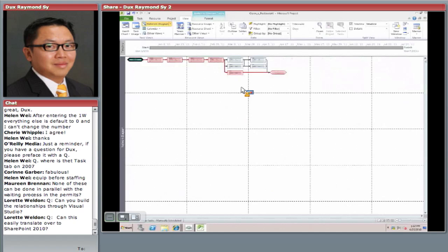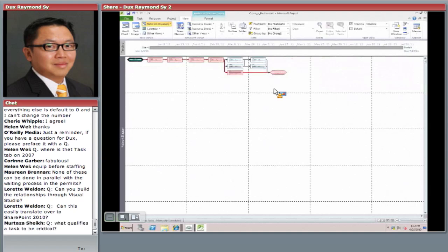A lot of folks do not understand that concept, and that's really disappointing, because this is a powerful concept, especially when you use a tool like Microsoft Project. Right now, I can tell, if I want this restaurant to be open on time, whenever that may be, these tasks cannot be delayed. Because anytime the task gets delayed, that's red, boom, my project is delayed. Now, most of the time, going back to my discussion around what the priority is, schedule or time is the priority. But in some cases, schedule might not be the priority. So even if this slips, no big deal, right?